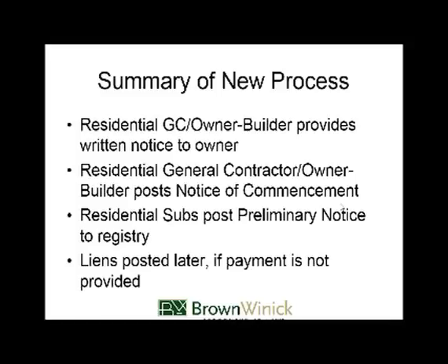I'm looking at a few more questions here. Some of these we've kind of covered. Another good question. If the statute is missed somehow, can the general or sub still sue in court to recover for the work? Yes, they can. They would have to rely on either a breach of contract or unjust enrichment or some other theory. They won't be able to sue based on their lien and won't be able to use the lien laws to try to enforce that.